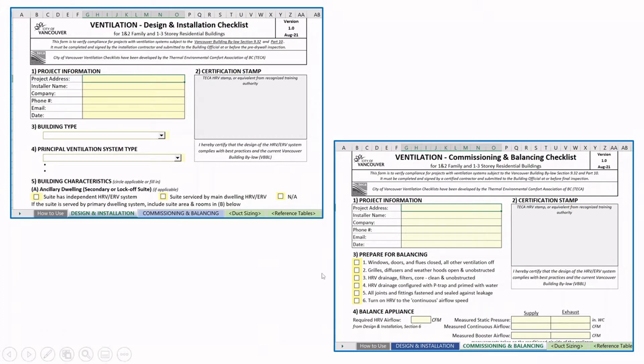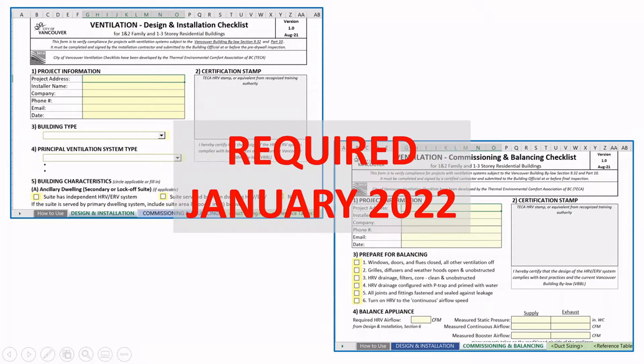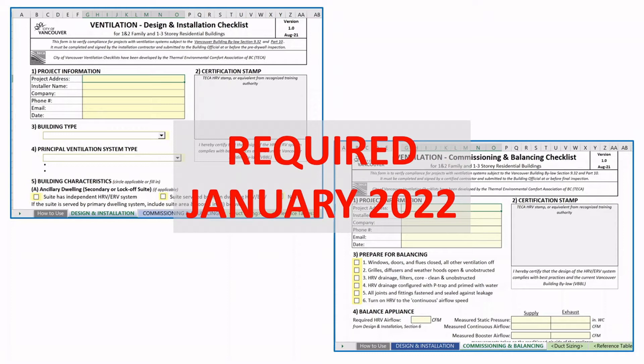These checklists are going to be required by the City of Vancouver in January 2022. These are optional to use up until that time.